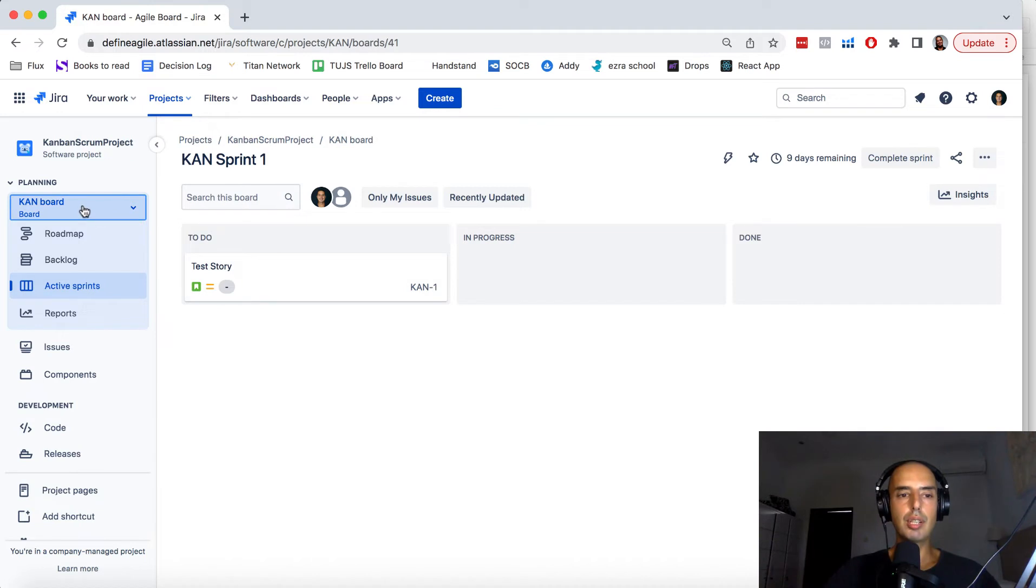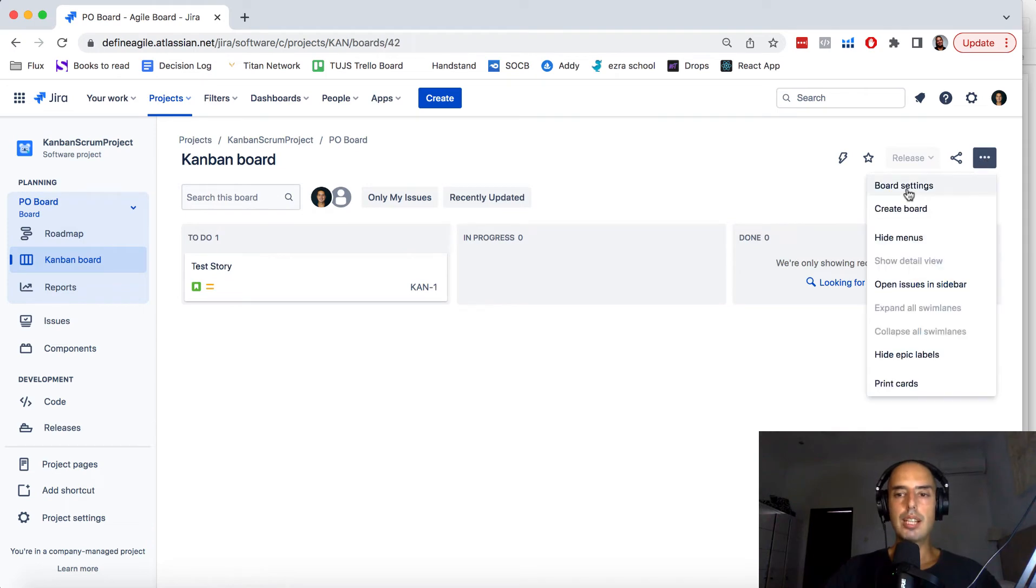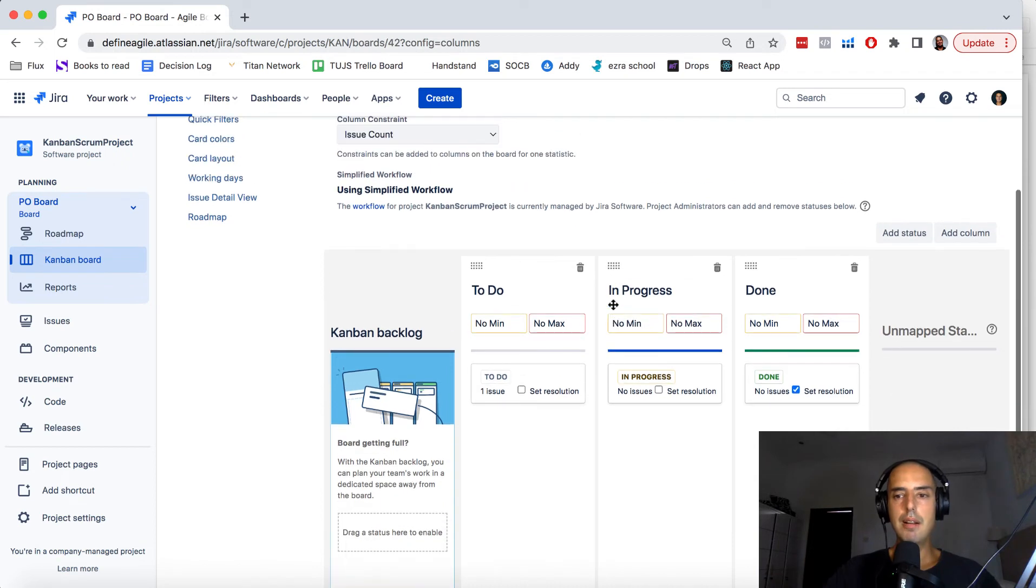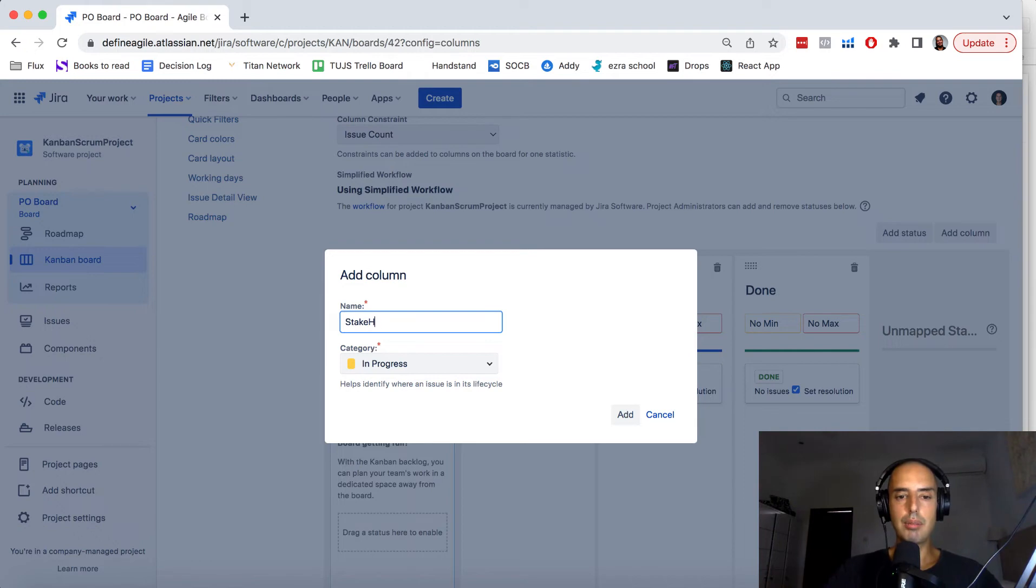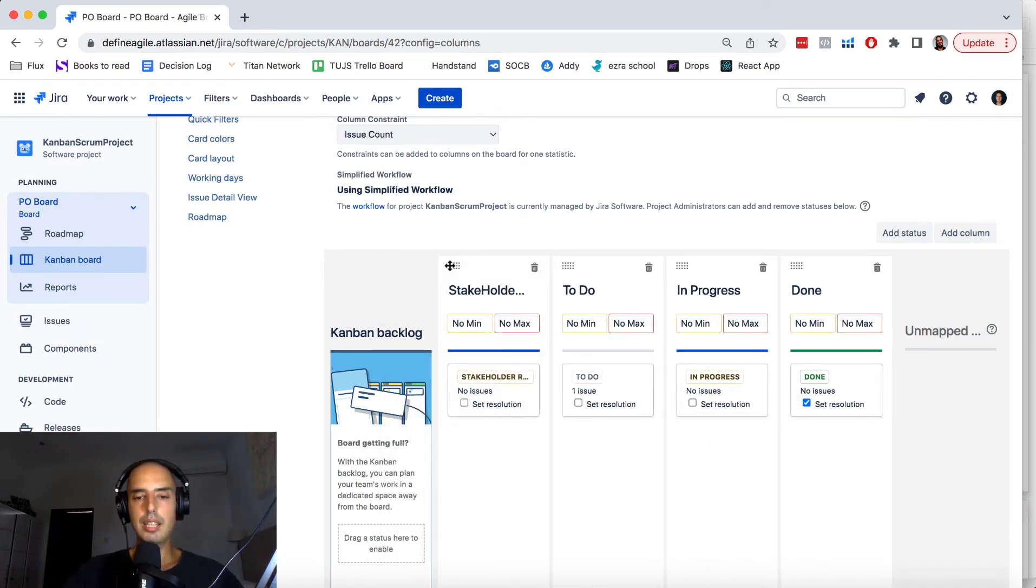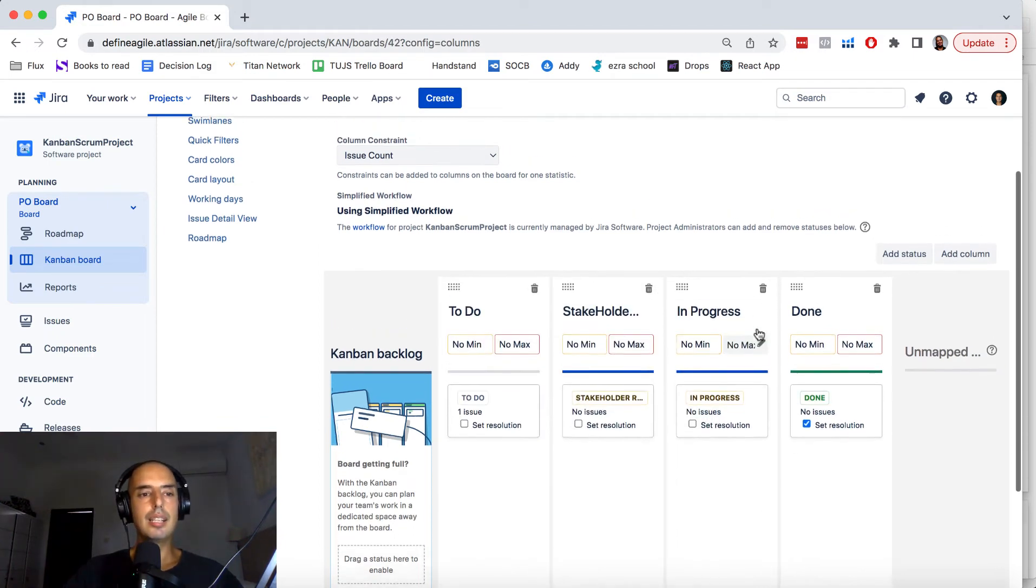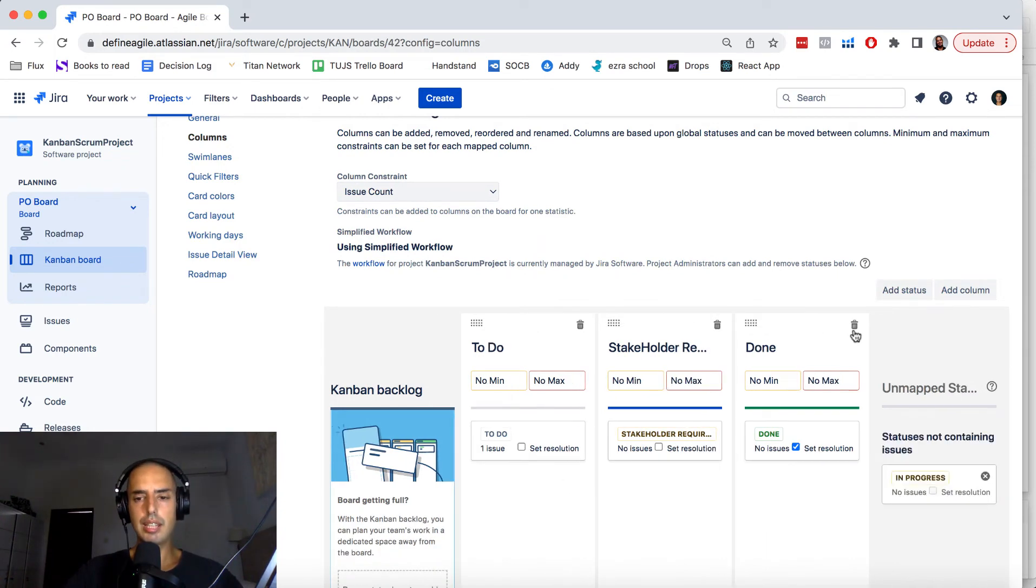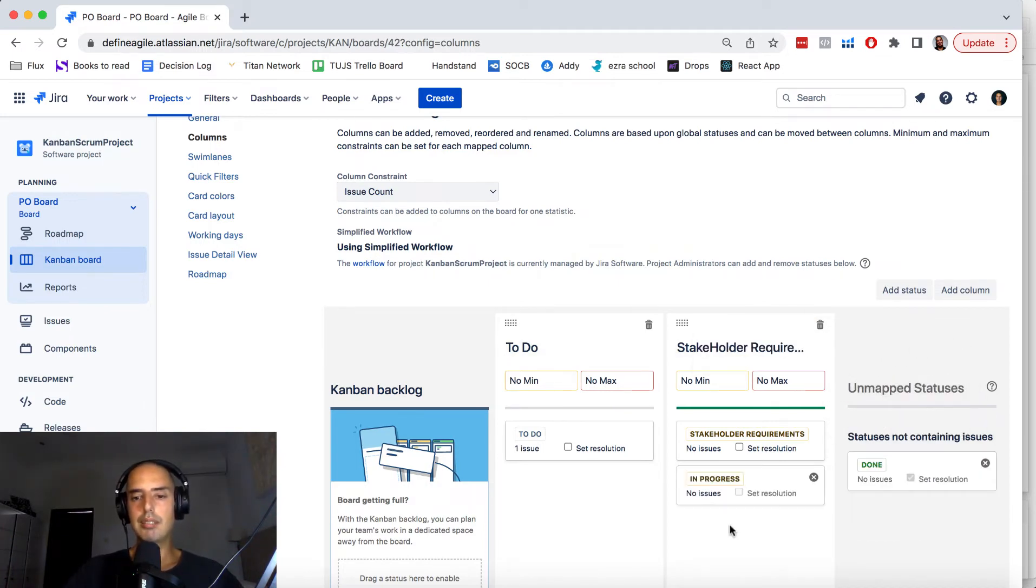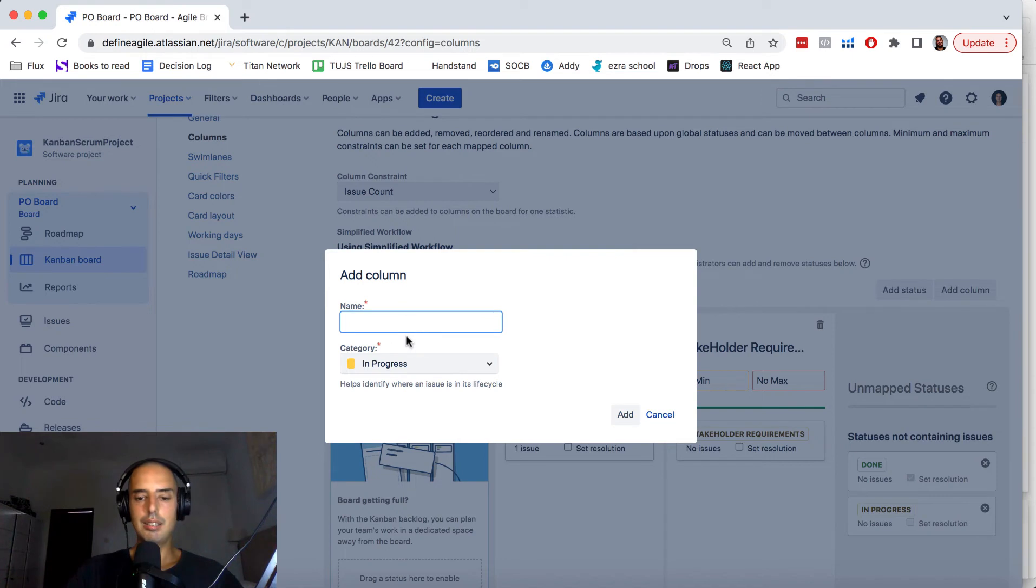Let's say for your PO board you can go to board settings. Okay I'm doing it even though I said I wouldn't but just to make sure that you guys are clear. You can add a column and you can have a column stakeholder requirements. And you can have a status stakeholder requirements and let's say this will be you have to do stakeholder requirements. And in your PO board you are not even getting to done. You just have those two things or maybe then you move it to in progress and then it appears in some other board. I don't know, maybe let's say to dev board something like that.